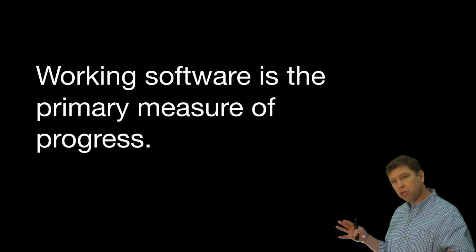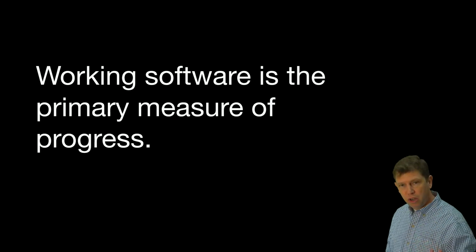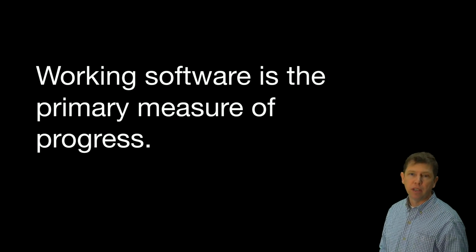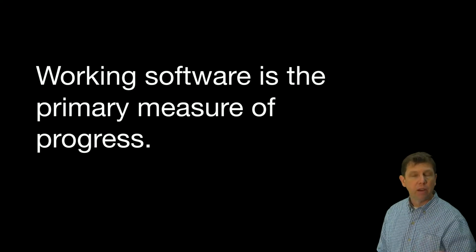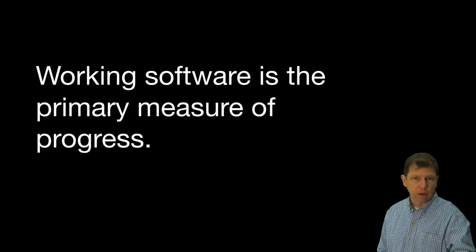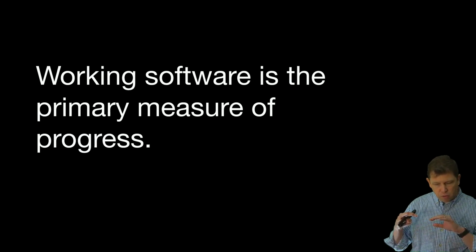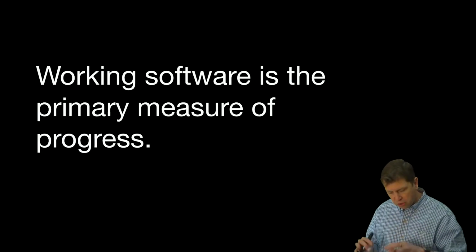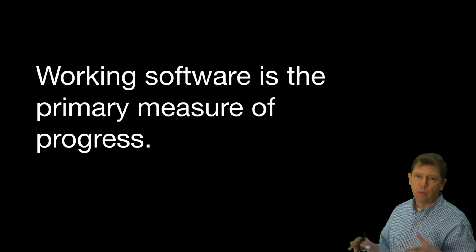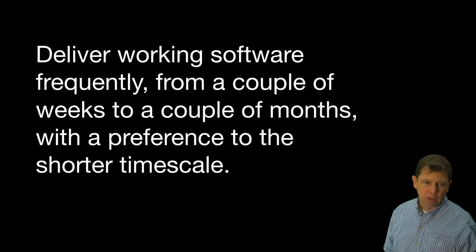Whereas if we wait and tell the whole story, we're deferring the point at which we make progress, which means we're deferring when we start getting feedback, and we're deferring when we will start getting value from it. So the reason I call these things out is because we want to be thinking about the value that we're getting from splitting the story, not just can we fit it in this kind of arbitrary time box we've got.